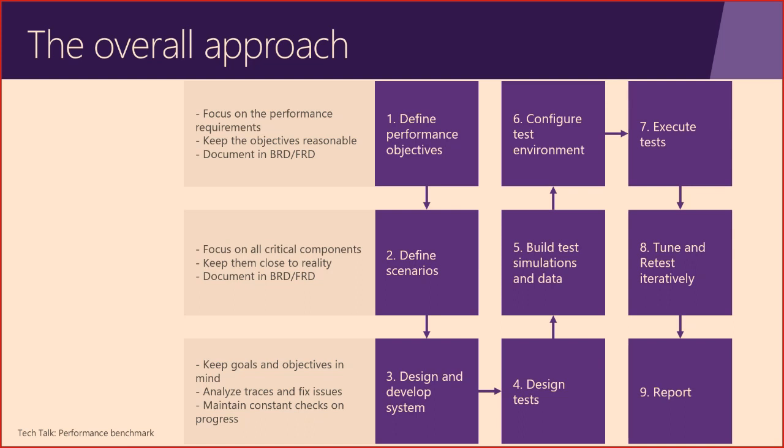And as you have done the preparation, you have the right scenarios, you have the right test scripts, the environment is prepared, you can then execute the tests, analyze the results, and iteratively tune the system, tune the solution, until you have achieved the performance objectives. If you don't have those targets set, then you never know when to stop. So once you have achieved all the objectives, you have actually confirmed that the solution will be able to perform the workload requested by the business, and you will work on the report.